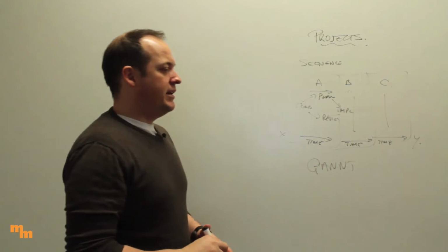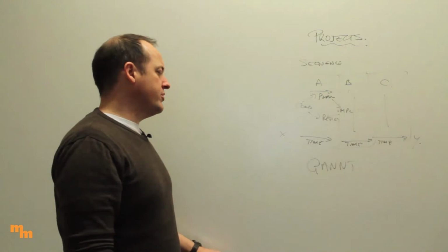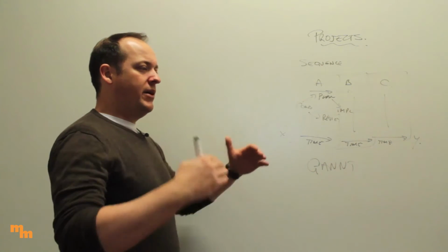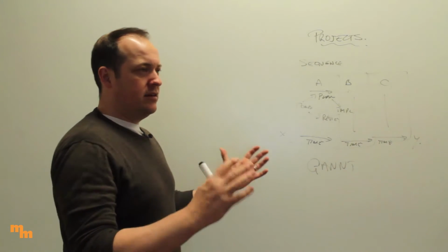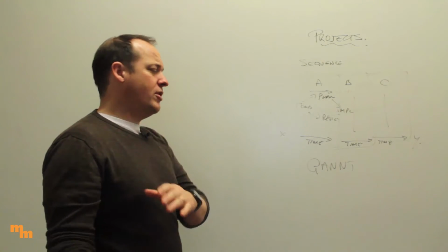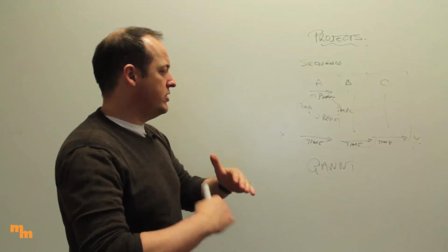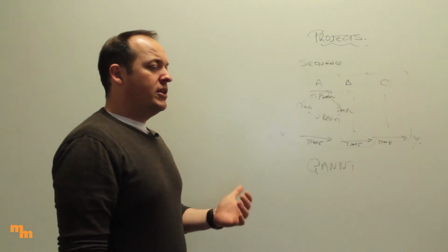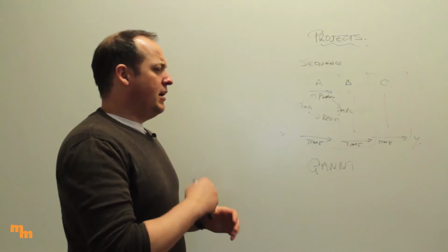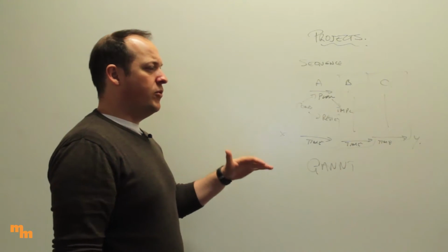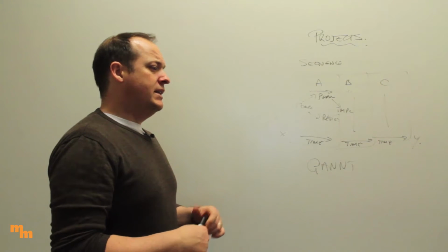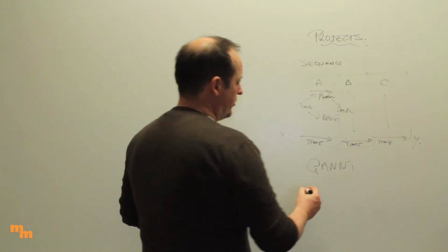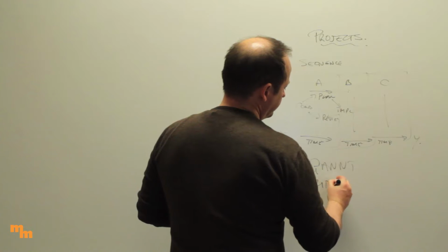Okay, the Gantt Chart, that's where you're going to overlay a bunch of processes against time, and that way you can start to think about where things fit, how long they're going to take, and at this stage, and lets you know when you can move on to your next stage and what things you can be doing concurrently. You can do critical path analysis, where you try and analyze the network diagram to work out the relationships there as well. Have a look through those, critical path.